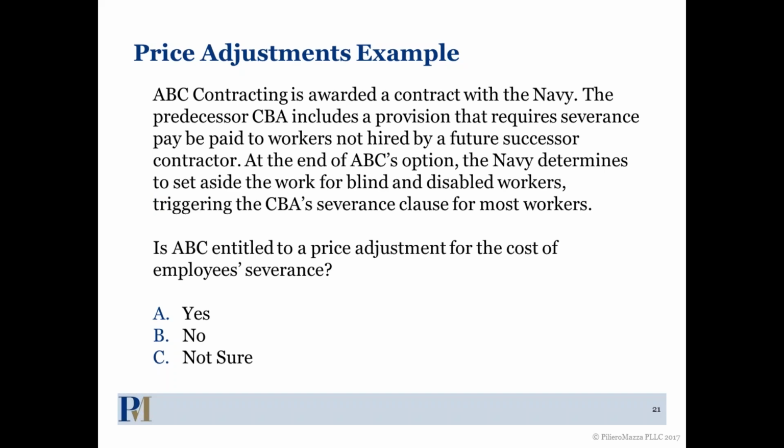The 46% of you that said yes are correct. So this is a hard one because it's like severance pay, really? But yes, there are cases out there that say that severance pay is a bona fide fringe benefit that you'd be able to capture. But of course, you're not going to be able to capture it on the front end. It hasn't happened. So there are certain costs that maybe are hard to capture in a price adjustment within 30 days of modification of the contract. Severance would be one of those.